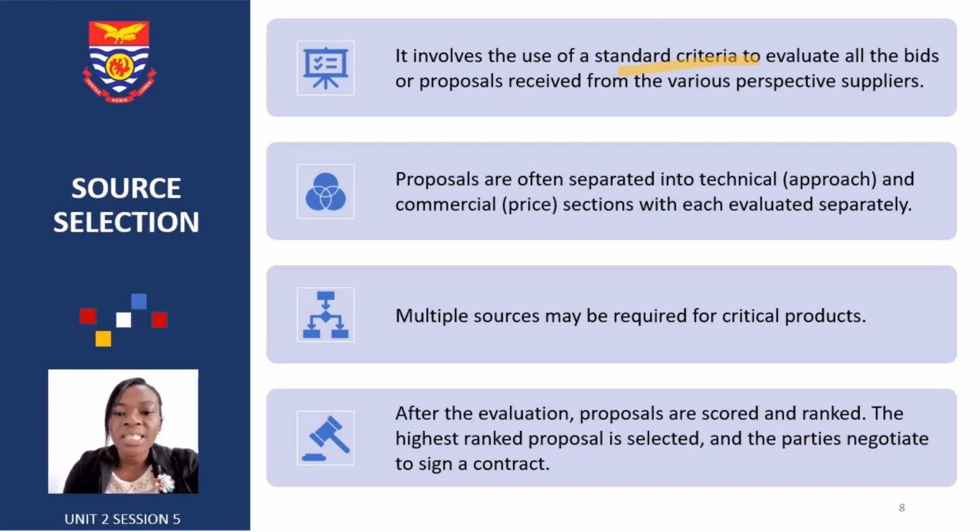Proposals are often separated into technical approach and commercial price selection, with each evaluated separately. You can't evaluate monetary things the same way you evaluate non-monetary things. When it comes to the technical approach, which is more of the standard proposals, how you evaluate them is different from the price driven, which is the bids or the commercial ones.